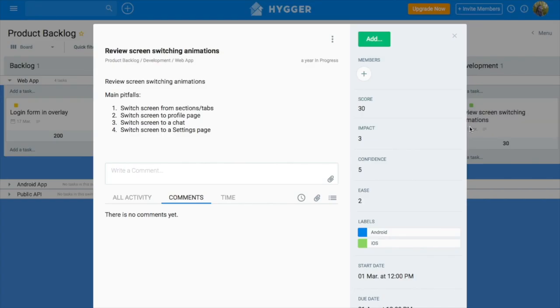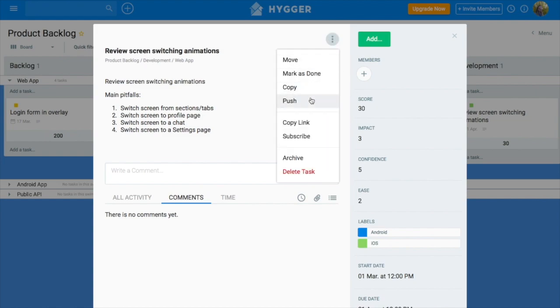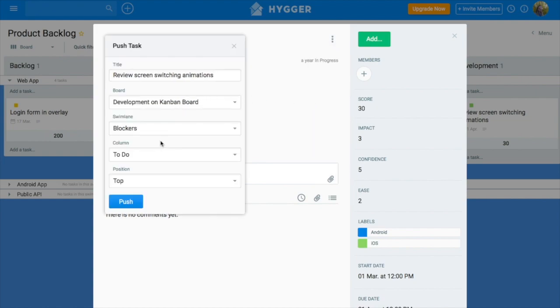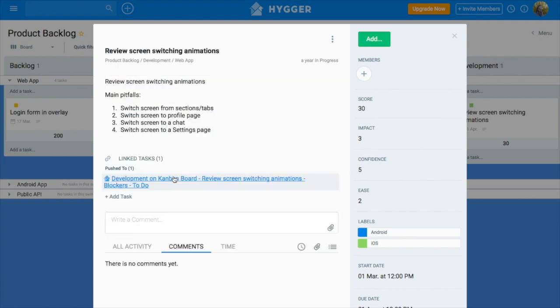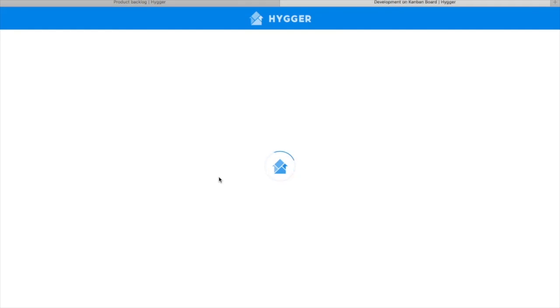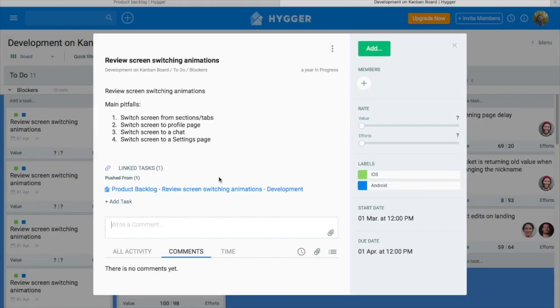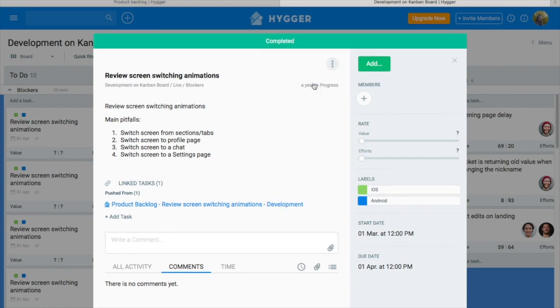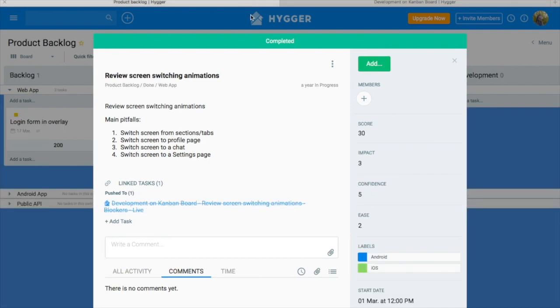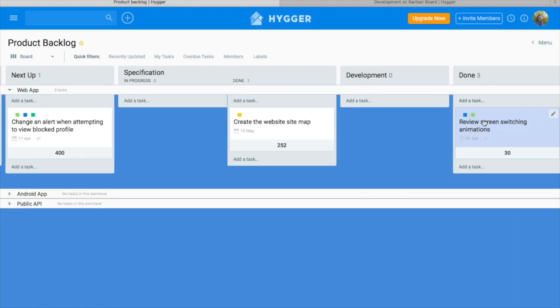When the feature is designed, you want it to be implemented and delivered. So you can push it to some external boards where you manage feature development. We have push command just for this situation. The original task and pushed one will be linked and its link will be displayed under the description. When you complete the task on the Kanban board, the pushed task will also be completed on backlog board and move to the done column.